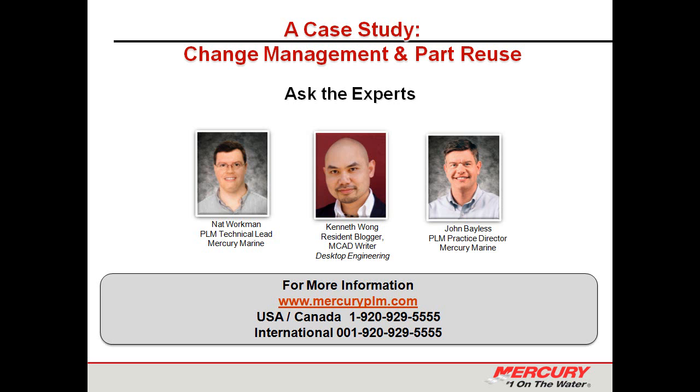Now, I was just going to say one little nuance to the change board on a new product program is that the team will have to come up with on their own when to initiate the change board. Obviously during the concept phase there will be a lot of changes as the broader engineering team is coming together in its concept, and maybe even starting to go from the concept to the detailed design. There are still really rapid changes. If you initiate change board too soon, you will slow down the progress into detailed design.